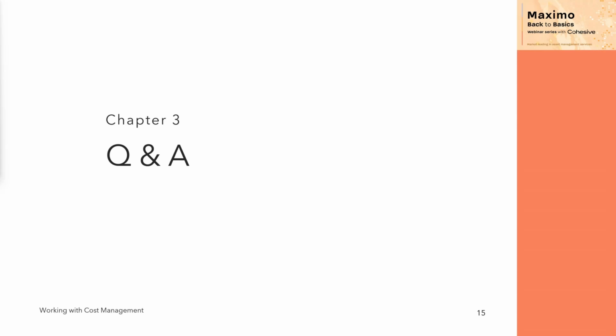But it's definitely doable with relationships in table windows and some of the calculation formula functions that are currently supported in Maximo now. You just might have different views. As I mentioned, if you've enabled the use of project and task on POs outside of a work order, you might have to have a separate table window to roll up the PO cost independent of the normal work order planned and actual costs.